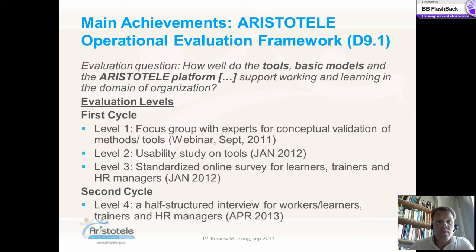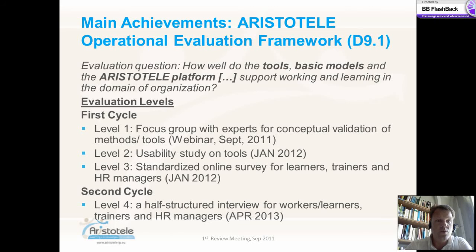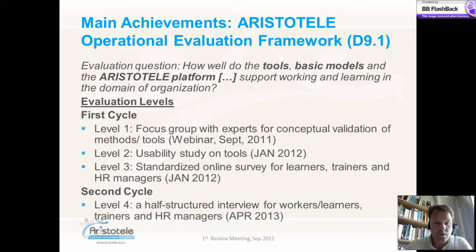The main achievement of the work package is the development, revision and publication of the Aristotle Operational Evaluation Framework, D9.1. In general, our evaluation framework follows the question: how well do the tools, the basic models and the overall Aristotle Platform support working and learning in the domain of an organization? Within our two-cycle approach of evaluation we have defined four levels. On the first level, using the method of a group discussion, we focus on conceptual validation of the methodologies and tools provided. This will be done in a webinar taking place at the end of September 2011.